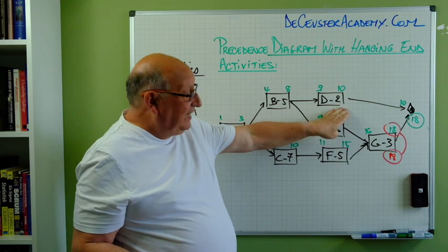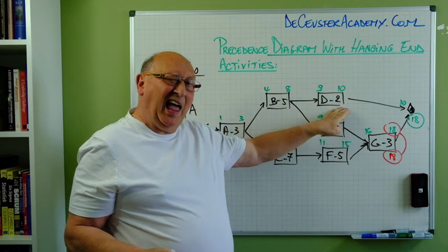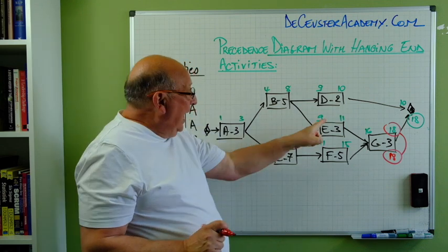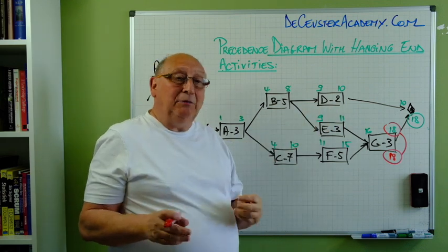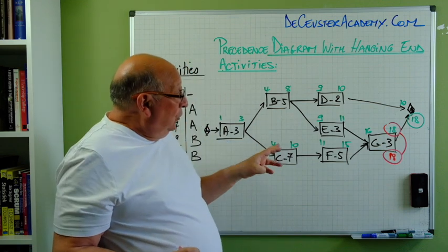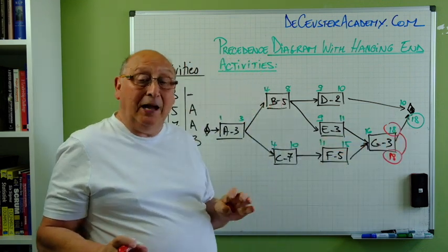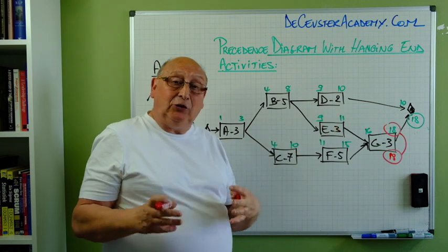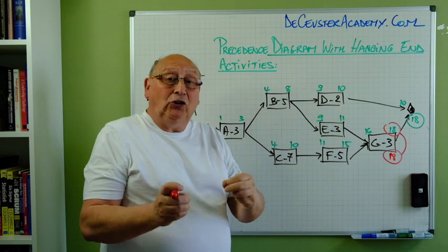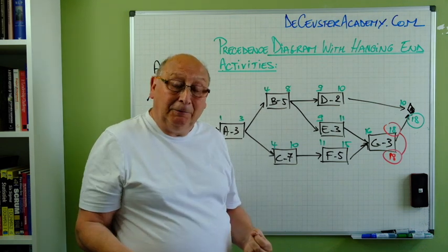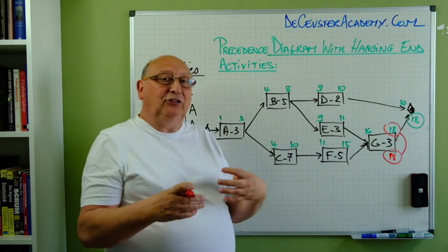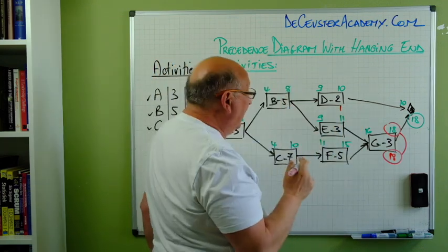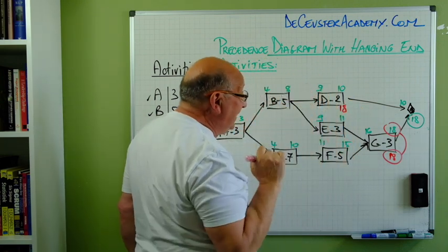And people say, well, here we count back from 10. And that's wrong, because what does it mean, the late finish time? What is the late finish time of activity D? The project will finish at time 18. So D can finish at period 18 without changing the duration of the project. And that's the definition of the late finish time. So when I put here 10, it will be an error, so we have to put 18 here.